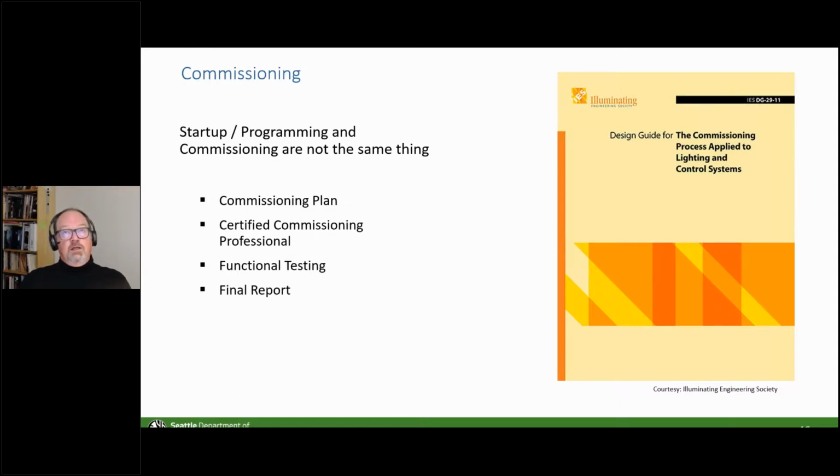Now, as Duane had mentioned, compliance with respect to this has been hit or miss in the past. If you've done projects in California, for example, you'll find that the compliance is typically hit or hit, right? You have to do it. So assume that you're going to need to do commissioning of your lighting and lighting control systems here, and in fact, other electrical systems as well.